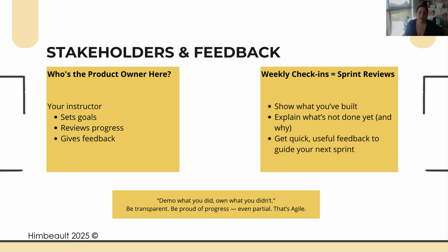You're going to do these sprint reviews with these little demos at the end of them. Within your group projects, your due dates are your sprint reviews, but that doesn't stop you from checking in with each other. So maybe you set half an hour aside a week to talk about the things that you have finished that week. Maybe it's nothing. Maybe your entire focus was drawn away from the group project because you had 4 exams. That's okay. But having those weekly check-ins, having half an hour set aside for each team member to present for 5 minutes on what they've done is immensely helpful.